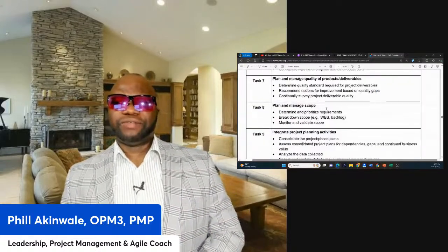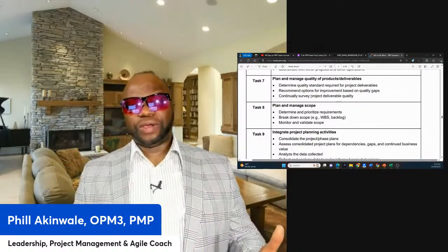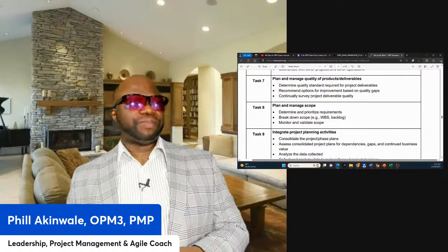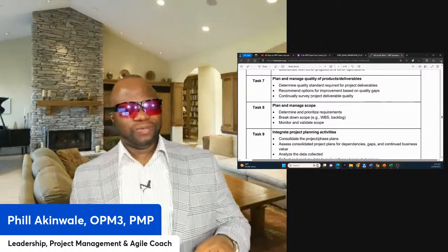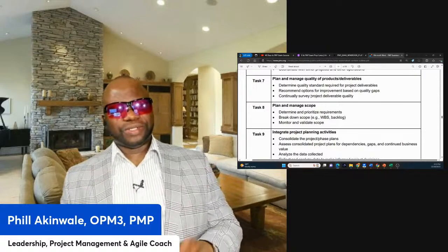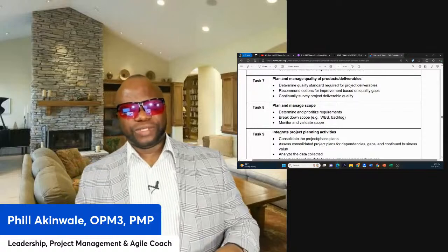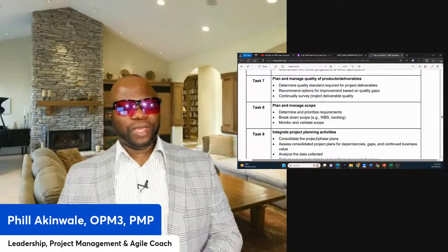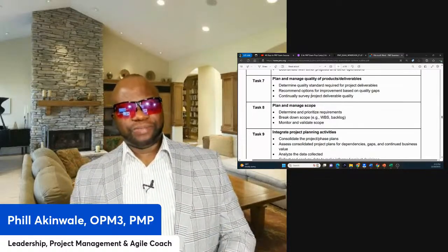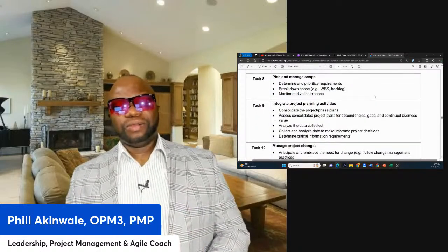Okay. Number 7, plan and manage quality of products or deliverables. So you got to understand the quality flow, plan quality management, manage quality, control quality. What is the difference between manage quality and control quality? Well, manage quality is more like quality assurance. What is the difference between quality assurance and quality control? Quality assurance focuses on the process, quality control focuses more on the product. What do we do more in quality assurance? We do a lot of audits. What do we do in quality control? Inspection. So, all of this lingo and mindset and understanding, you got to get good in it.